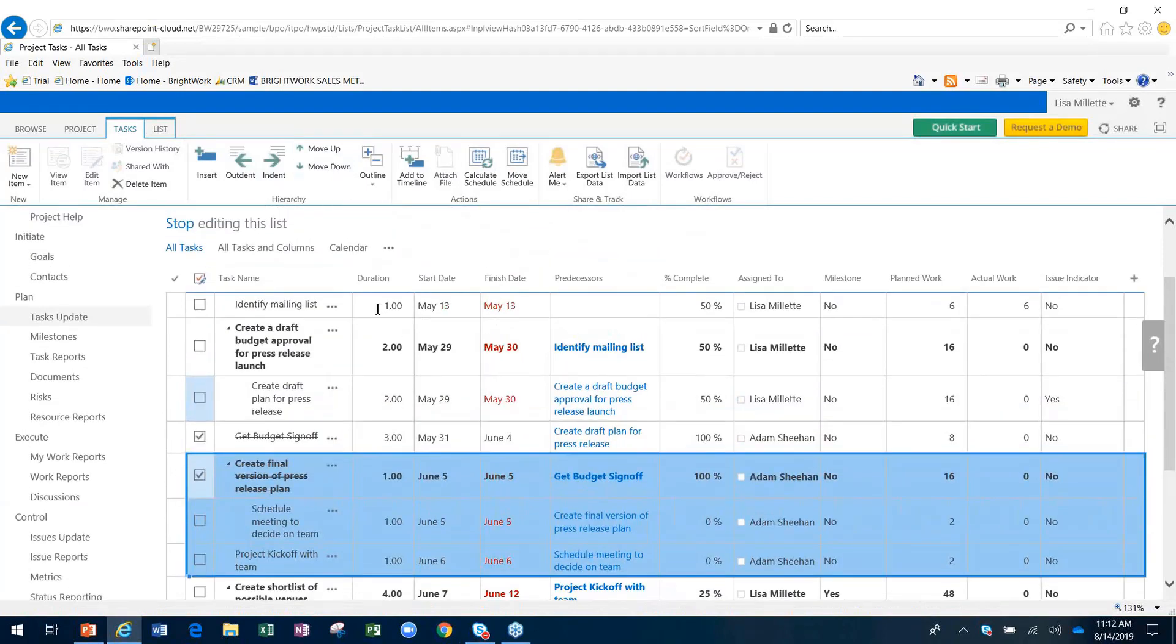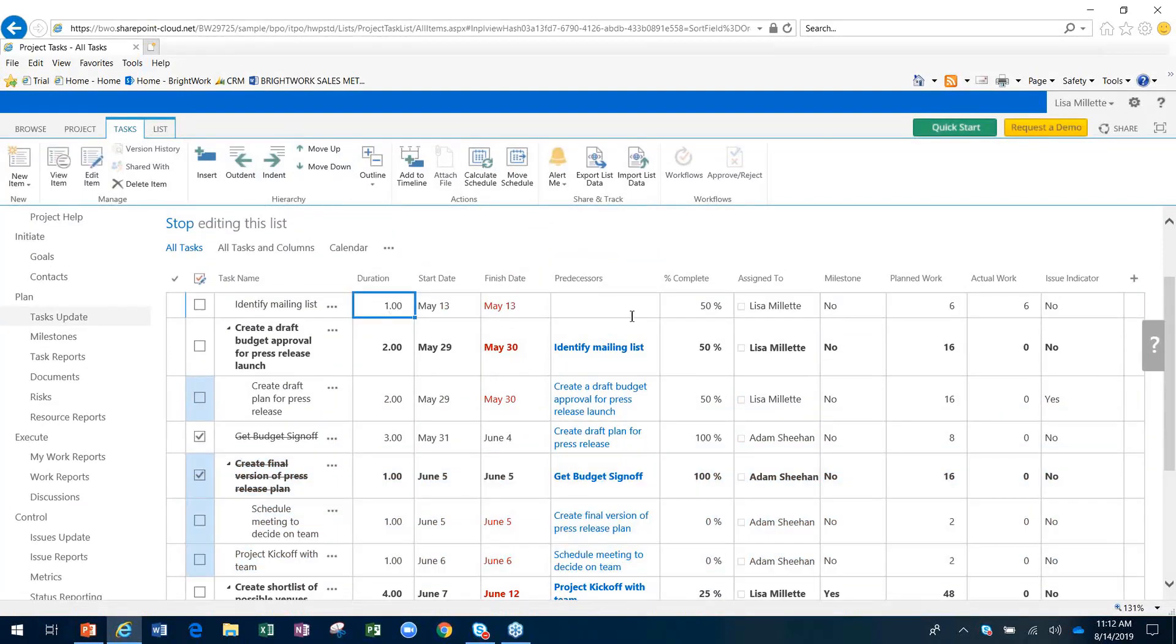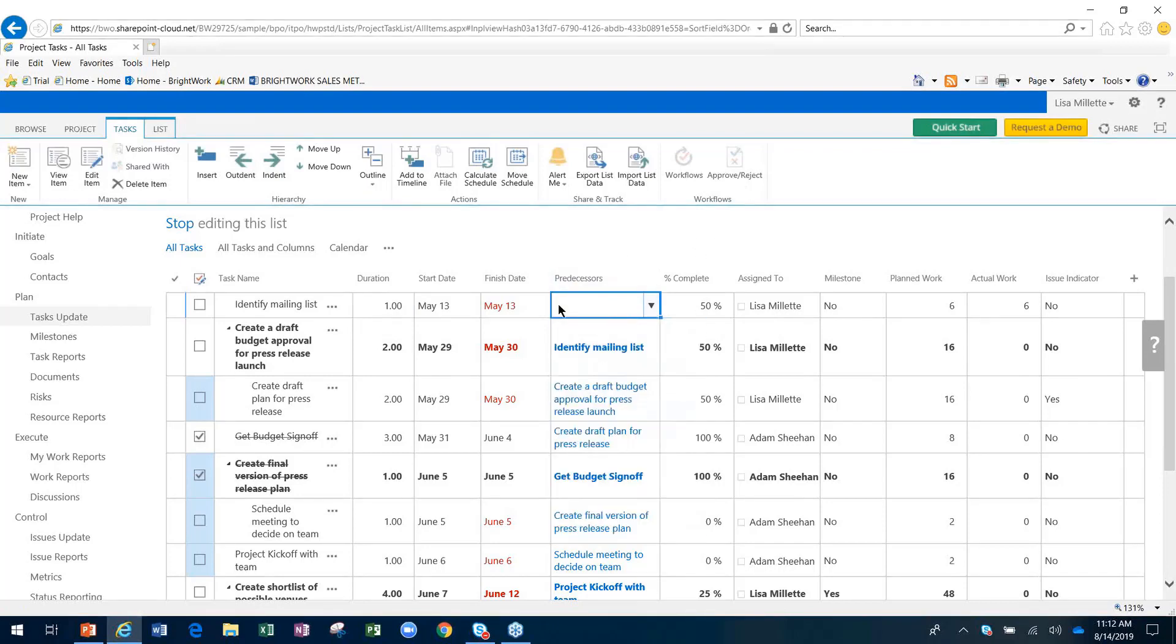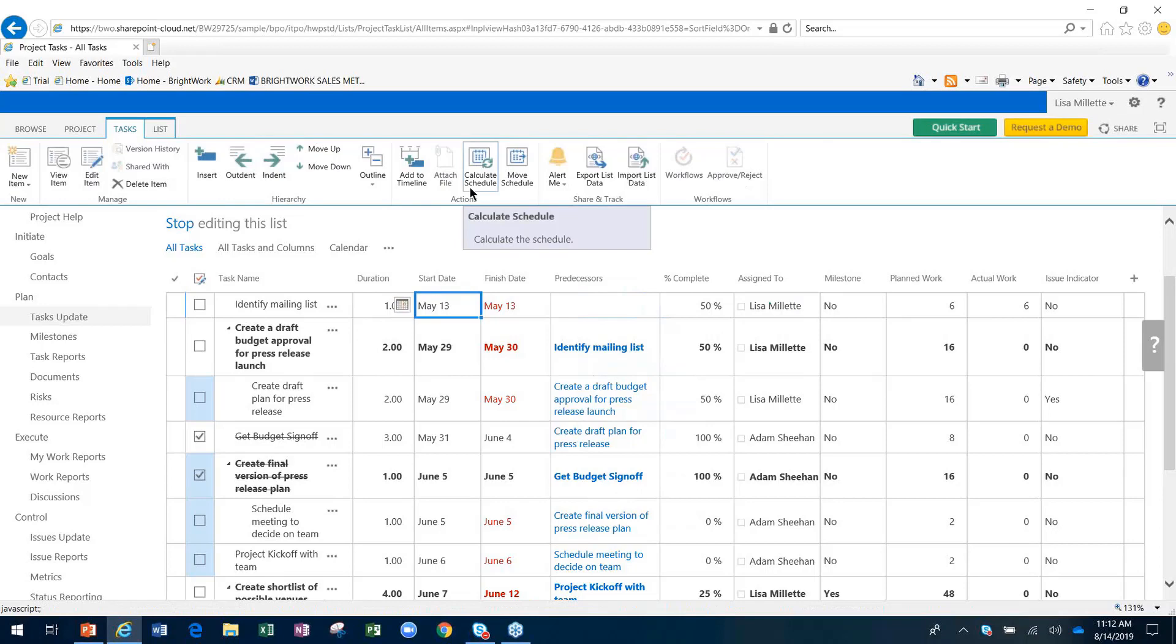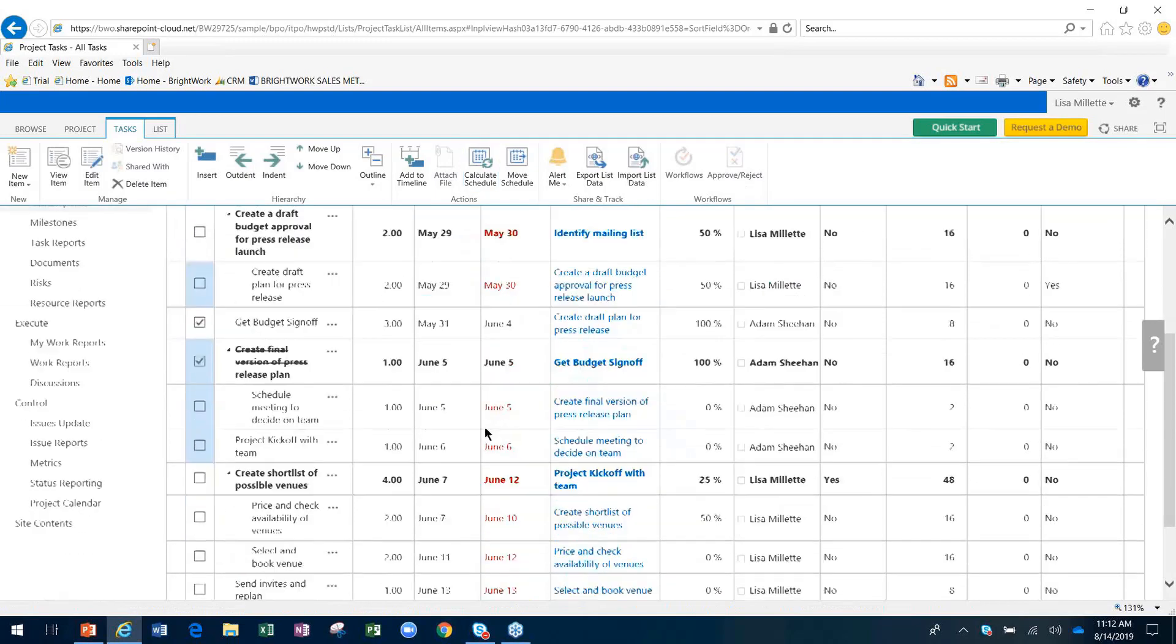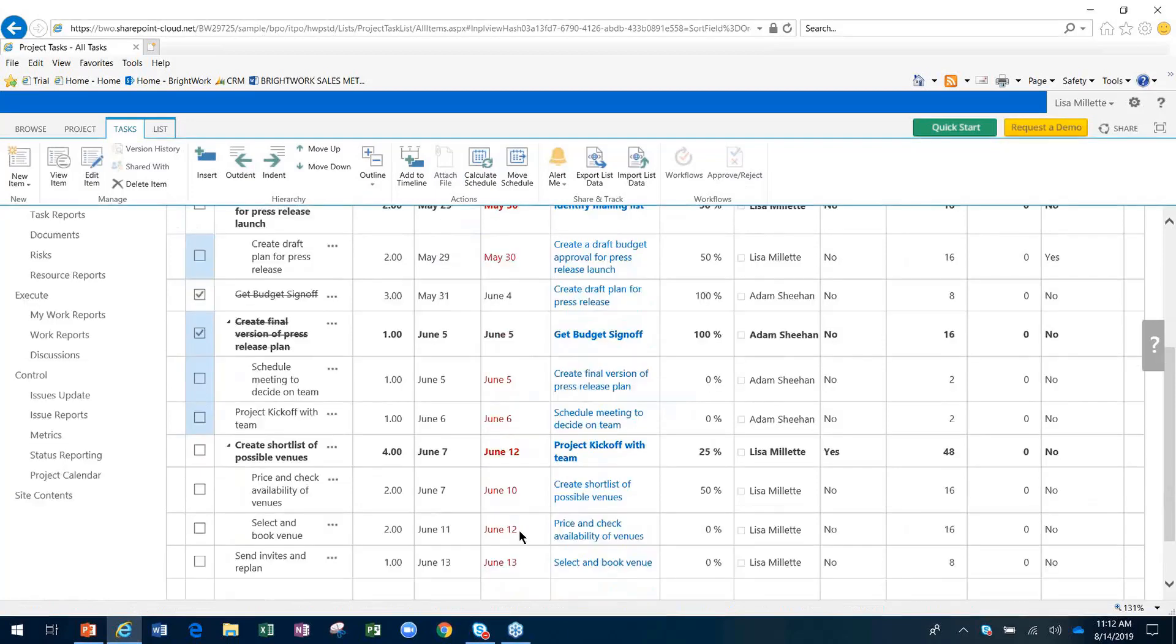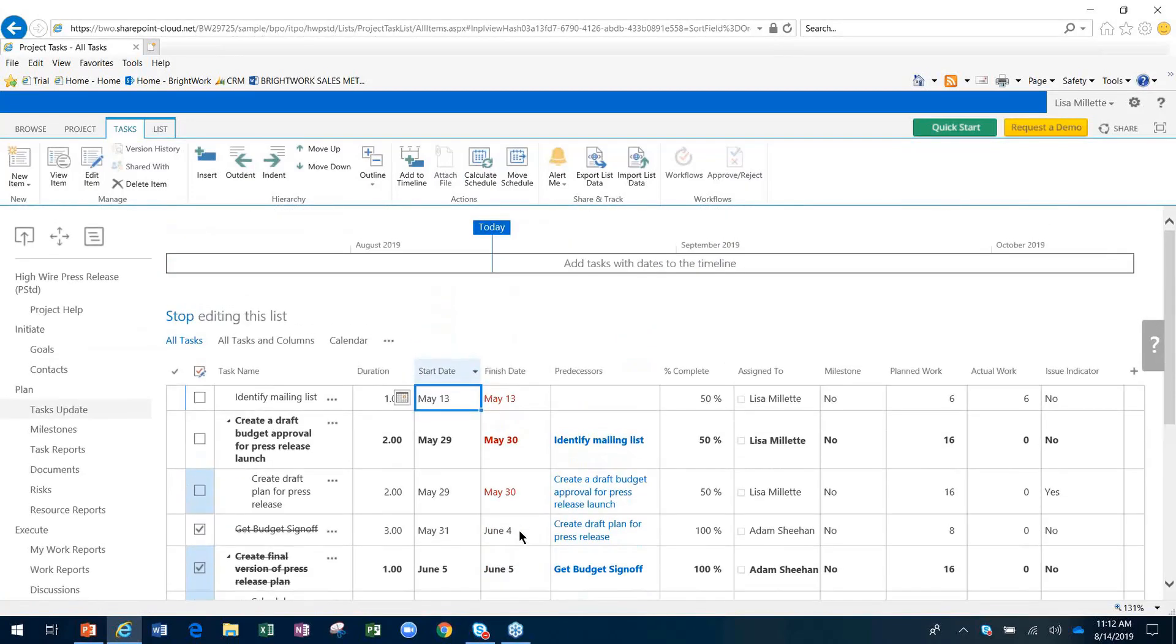We can put in our durations and predecessors in this nice, easy drop-down fashion. Once we've done that, we'll simply put in our start date and using the BrightWork in-browser scheduler, we can calculate that schedule. It will go through and figure out that schedule for you, put in those dates, and you'll be good to go.